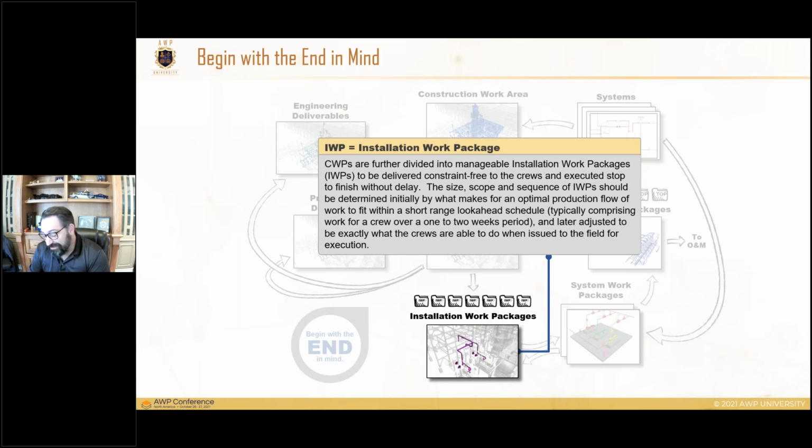So what's the size of those work packages? Well, here's the thing. For a long time in the industry, an IWP was sized, you know, we said in the original 272 literature that an IWP in essence was 500 to 1,000 hours worth of work, which is not wrong, but that is a go-by. It's not a rule. And IWPs can be sized in many different ways.